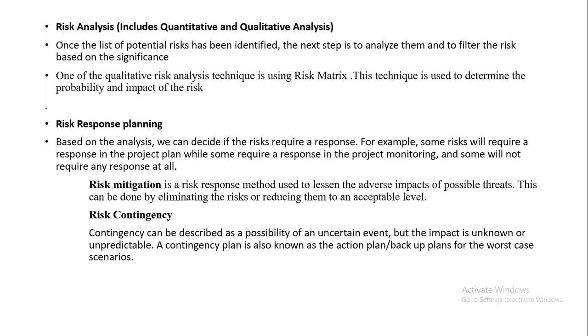Means we can do this by eliminating the risks or reducing them to an acceptable level. Maybe because of a change in the functionality, if we can make that change, we will eliminate the risk. Otherwise, we will at least reduce the risk. That means the impact will reduce, or the time duration we are expecting will reduce to an acceptable level. That is nothing but risk mitigation.